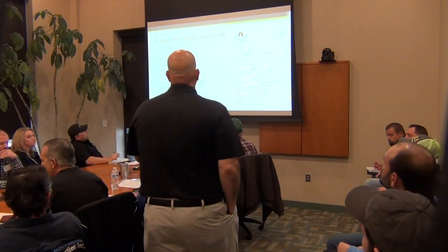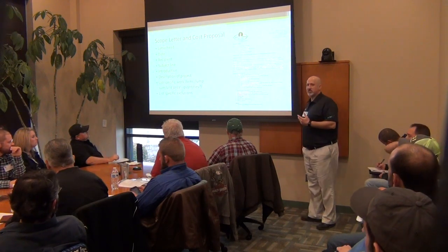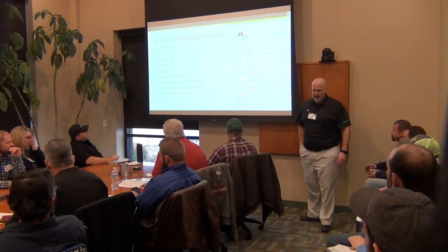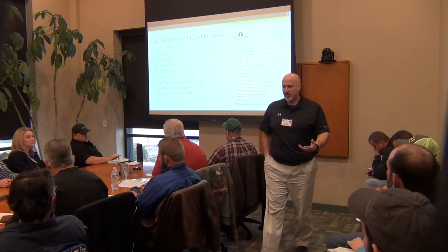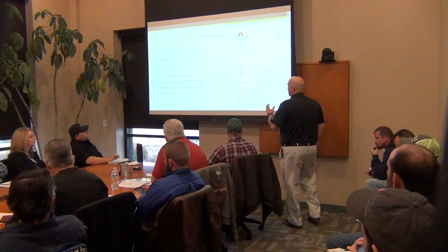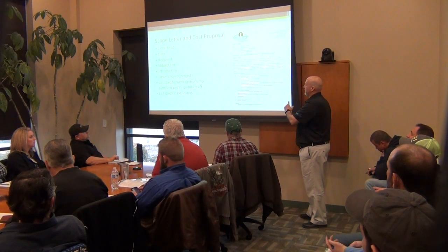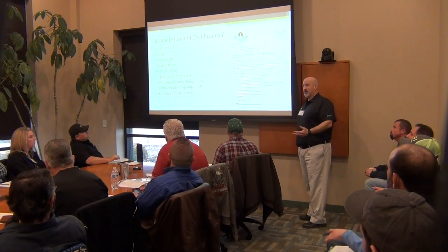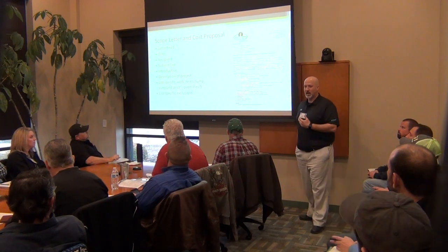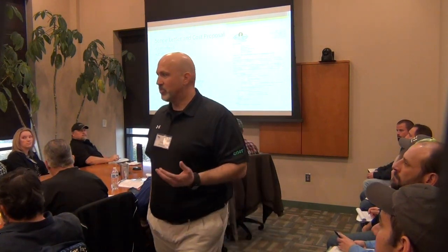Where was that? Okay. I think there's a fine line sometimes between giving too much information and not enough. For example, let's say you're going to lay 8-inch pipe. You got 1,000 feet of it. It's a lump sum bid, right? And you tell them I've got 1,000 feet of pipe. Then they change the scope and they want to take pipe out, right? And it's a lump sum bid. Then you're at the mercy of them arguing back and forth about what the deduct should be or something like that, right?